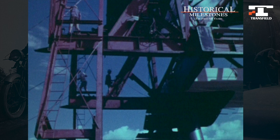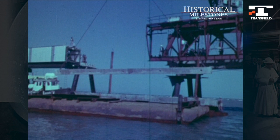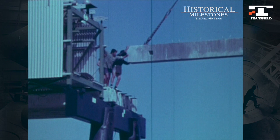The bridge, 60 metres long and weighing 120 tonnes, was completely self-contained, with welding machines, air compressors, crew shed, stores and pile hammer. All approach jetty construction work was done from this bridge, including pile driving, the placing of the headstocks, conveyor galleries and concrete deck girders.